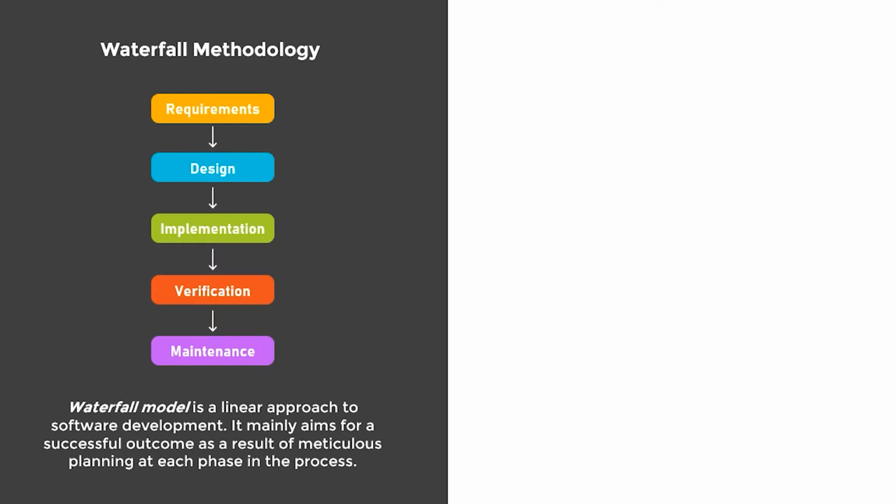In the waterfall methodology, the sequence of events is something like gathering and documenting requirements, design, implementation, verification and testing, and at last, fixing the issues and delivering the product. Each phase generally finishes before the next one can begin. While the waterfall model has its merits, its potential drawbacks such as less customer involvement, difficulty to include new requirements, and last-minute testing have led organizations to use Agile methodology.